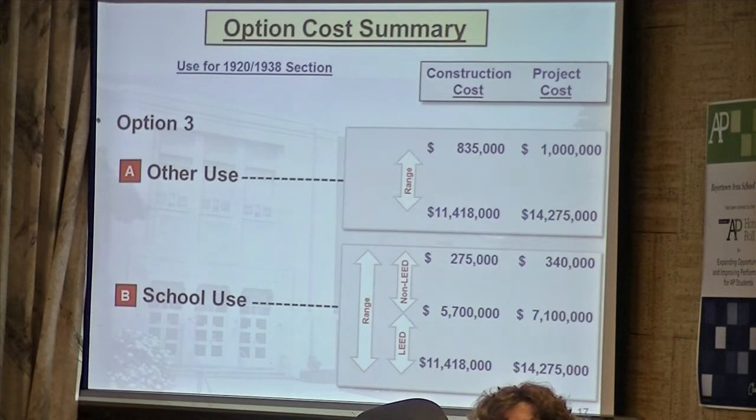And so far, there was no problems with anything? The initial meetings that we had, we looked at the zoning ordinance and the land development ordinance, and then they would do a building code review prior to issuing the building permit. So that final code review usually occurs right before we go out to bid.